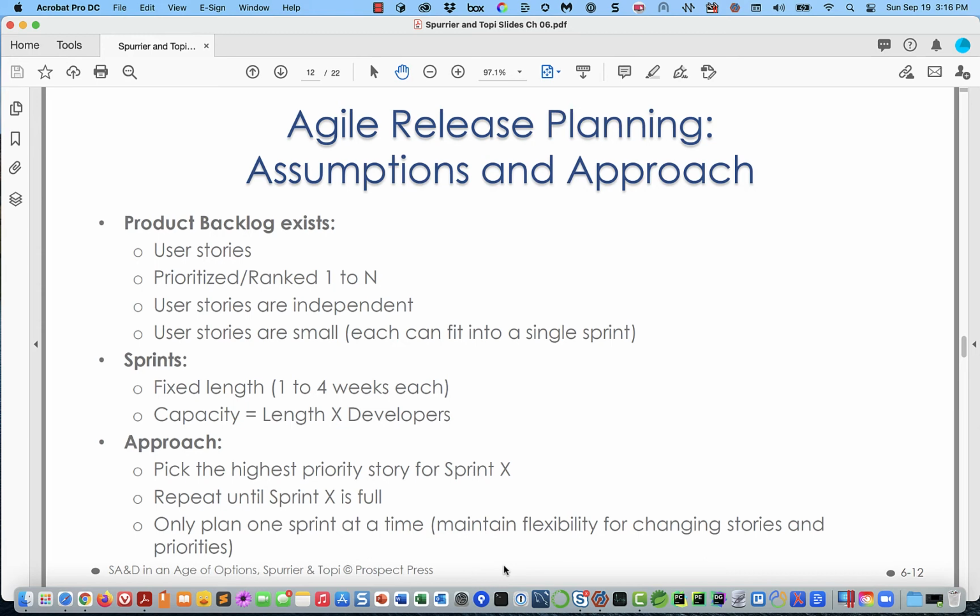It's going to take 50 weeks. Are we going to wait until the end of the 50th week to release the software for people to use in the field? Or are we going to want to have one halfway through and one at the end? Or one a quarter of the way through, one halfway through, one 3/4 of the way through, one at the end.